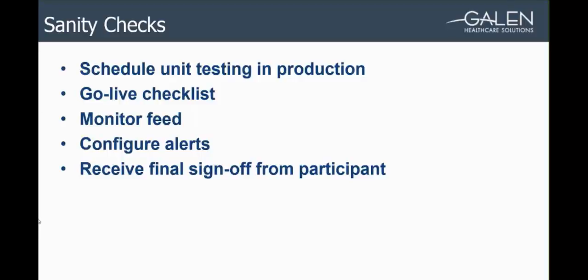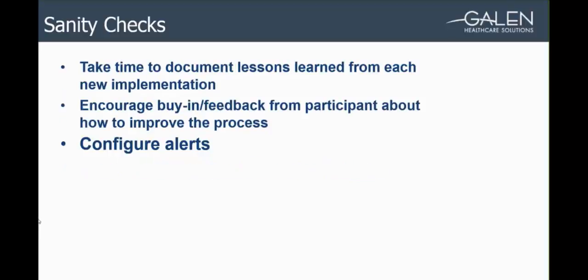And finally, you'll want to receive sign-off. Once you've monitored the feeds for a good amount of time, you've gone through your Go Live checklist, you've had the participant confirm everything is looking good in the portal, and from their end, you're ready to close things out. Your organization should work to develop a sign-off sheet that indicates the participant and the HIE agree information going to the portal is correct, complete, and flowing. Any other details in regards to the connection that are pertinent should also be included. This serves as proof that the interface was built thoroughly and with buy-in from all stakeholders should there be any questions going forward.